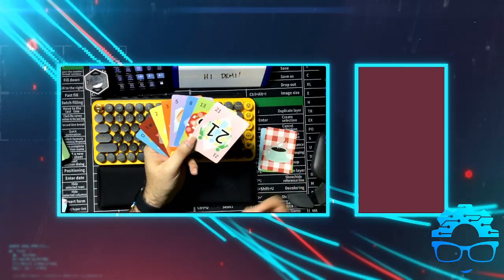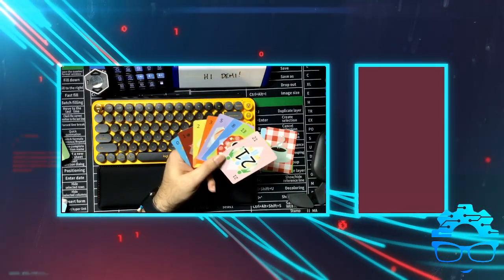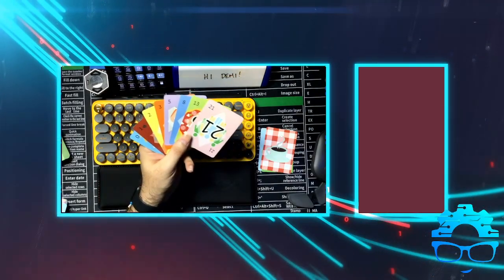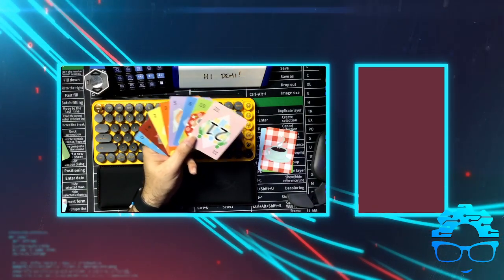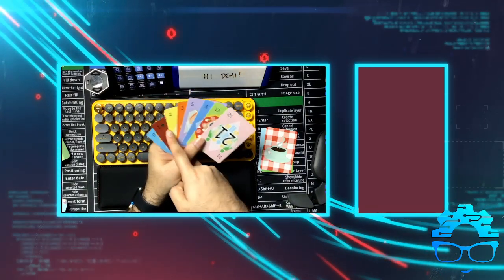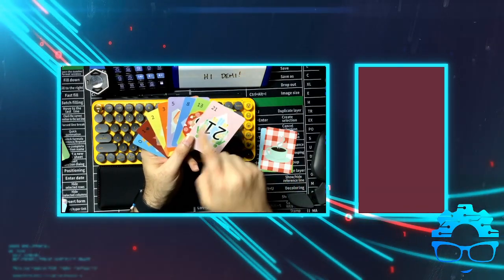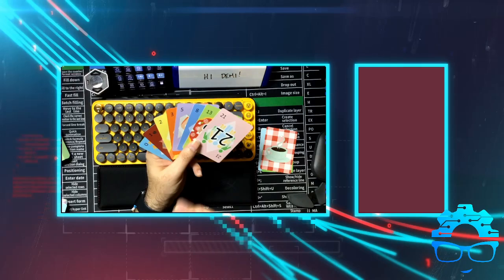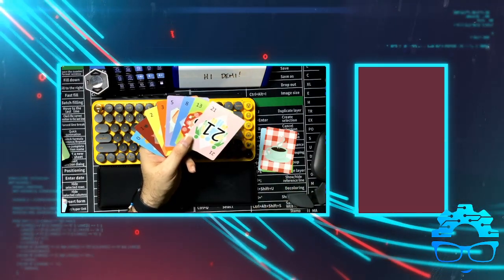And that goes specifically for data tasks. For example, if there's a simple insert statement or a simple, hey, we want to get data into this database, that's fine. But if there are 100 files, that's the difference between a 1 and a 21. And so that's what I try to make very clear. It's not only the complexity of the task, but also how long we think it's going to take.